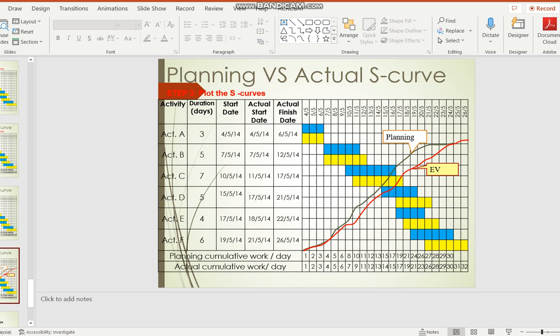So let's say this is just about work progress. Everything is 1%, let's say, and then you're just doing this cumulative, and this will be what we call the work performed. This is what we call the work schedule. So this is called PV and this is called EV. So at any point in time, especially as the progress moves on in the project, you will